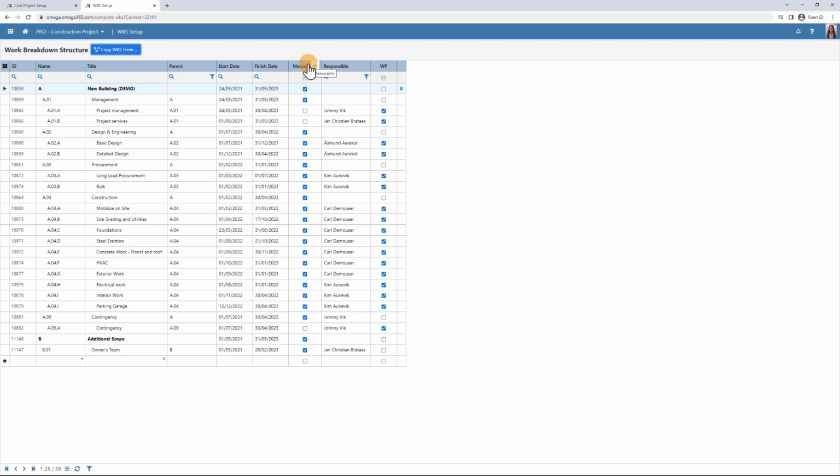To delete a WBS element, you click on the X. But note that you can only delete a WBS element if it does not have any estimates registered against it, or if it has been time-phased. However, you can cancel WBS elements. You should first set the estimate to 0, for example by removing the estimate items, or by creating a negative estimate line, which zeroes the estimate. Then also update the time phasing so it reflects the zero cost estimates.